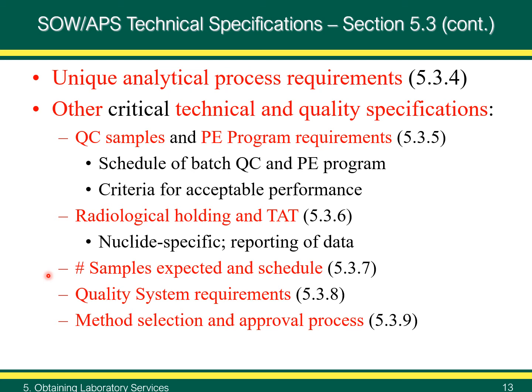This information is important to evaluate the radioanalytical method proposed and the allocation of staff and equipment resources. Also, in order to ensure that they can meet TAT commitments, commercial laboratories must plan sufficient sample processing capacity for multiple clients sending samples at the same time.